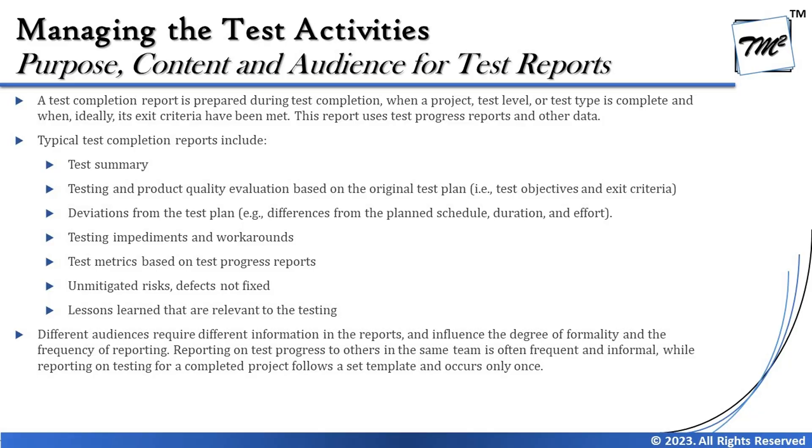The frequency of report creation is defined by your target audience. The level of formality — whether high-level, detailed, graphical, or tabular — is also driven by the expected stakeholders. Reporting test progress within the same team is often frequent and informal, while reporting for a completed project follows a set template and occurs only once. Test progress reports are created periodically, while the test completion report is more detailed and created only once at the end of the project.